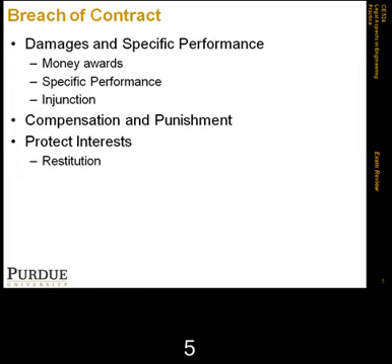We talked about the difference between cost and value, and we also have another important protected interest, which is called reliance, which includes expenditures made before or during relying on the agreement. So if someone is promised a certain thing in an agreement and they acted before the agreement is made, or during it, relying on it, and they made any expenditures, then the protected interest we try to protect is their reliance, the money that they spent in reliance.